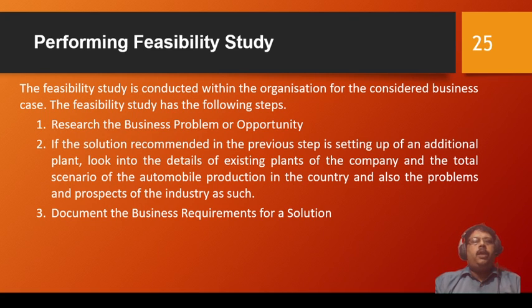When certain projects are decided or designed, we have to understand or see whether the project you are going to conduct is feasible or not. So it is very important in the initial stage to conduct the feasibility study. If, after a certain stage, we start doing the feasibility study and find that the project cannot be accomplished or we cannot achieve the goal, that can become a problem. So it is very essential to perform the feasibility study in the initial stage of the project.